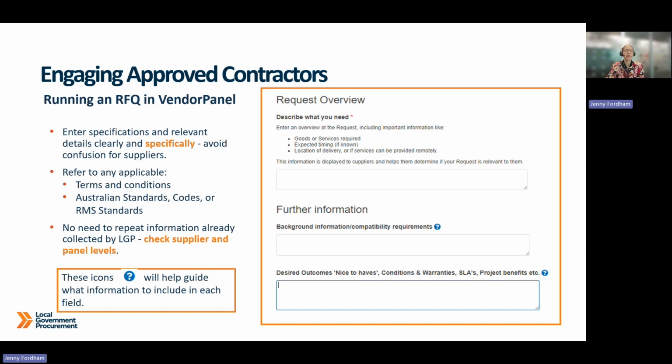What an RFQ should look like, not an historic novel like War and Peace. Step 3 is where you enter your RFQ details. Make sure each field is filled out clearly so suppliers know exactly what's needed. Include your scope, your quantities, your timelines, and any relevant standards or terms.